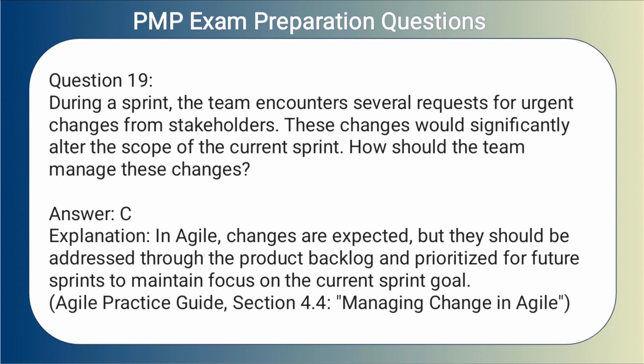Answer: C. Explanation. In Agile, changes are expected, but they should be addressed through the product backlog and prioritized for future sprints to maintain focus on the current sprint goal.